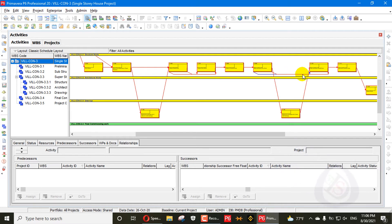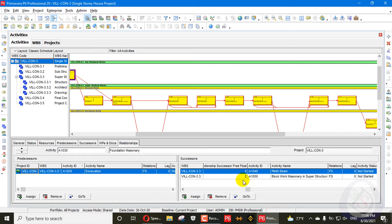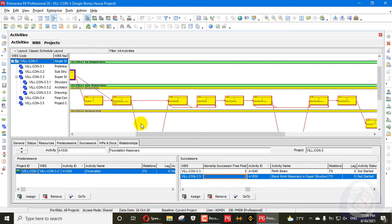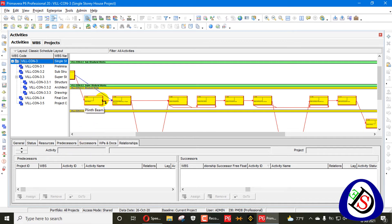There is another activity that also has a float of two days — block masonry work in superstructure. Block masonry work in superstructure has two days redundant, so this relationship is also a redundant relationship because this activity cannot be done after doing this work. It disturbs our CPM relationship as well.